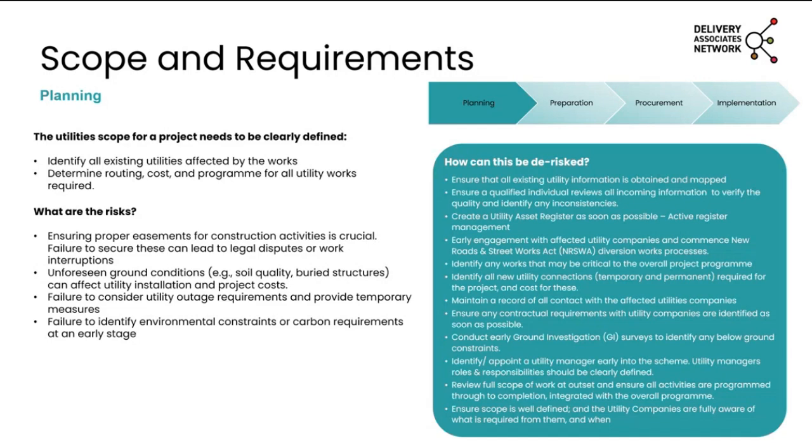Talk there about legal issues as well in terms of land ownership. It's very crucial to understand who owns the land that you're going to be working in. When you're working in a highway, that's normally fairly well defined, but when you go into private land, that carries a greater level of risk, and that's something that you need to address as early on in the project as possible.